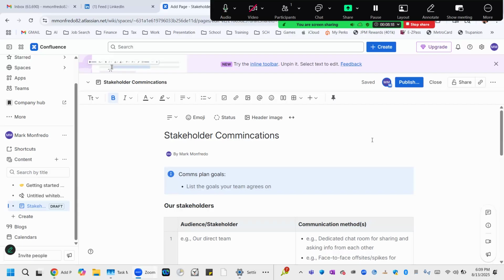Here, we're going to be looking at a Confluence whiteboard page where we can list all of our stakeholder communication preferences except for the sensitive information. That sensitive information is just for the internal team only, so the internal team is aware of influence levels. This is for the wider audience. Anyone that has an active engagement or investment in the project will be directed to this page.